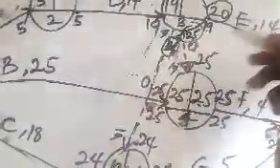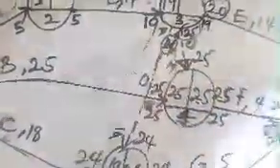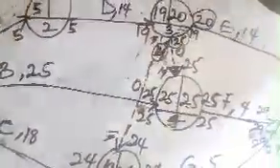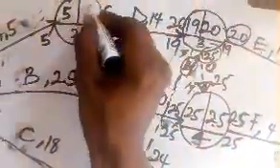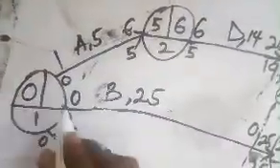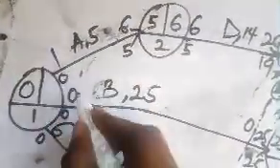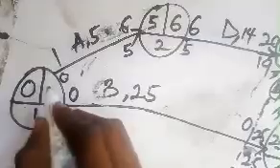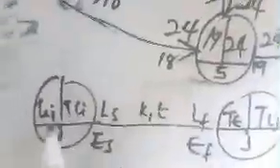So what is it? We are considering the smallest. So the smallest is what? 20. So 20 will enter. So when my 20 enters, it comes out. 20 minus 14, 6. 6 enters, 6 comes out. 6 minus 5, 1. So here I have my smallest, which is 1, 0, 6. So my smallest is what? 0. And that is the completion of this particular thing.